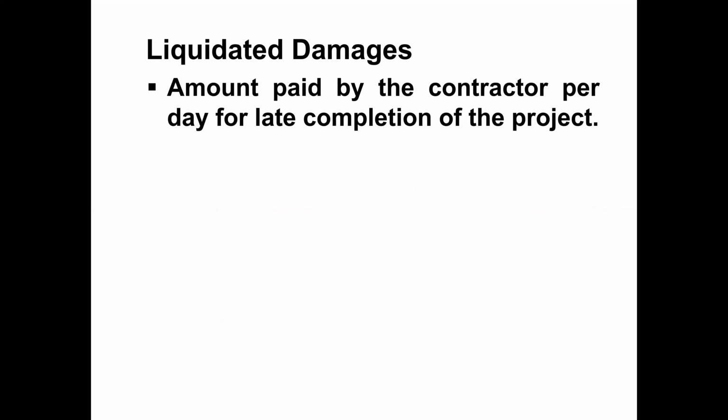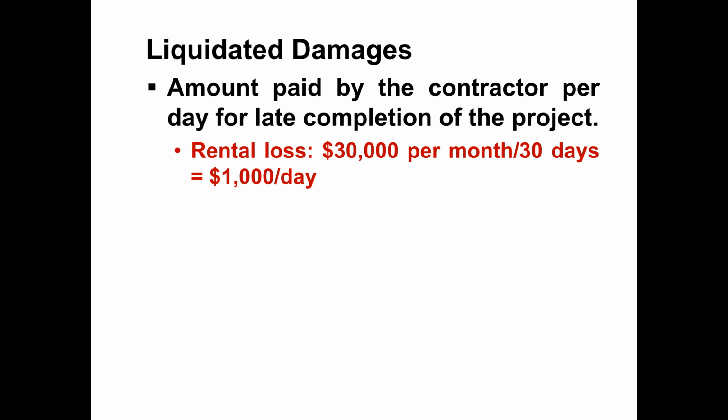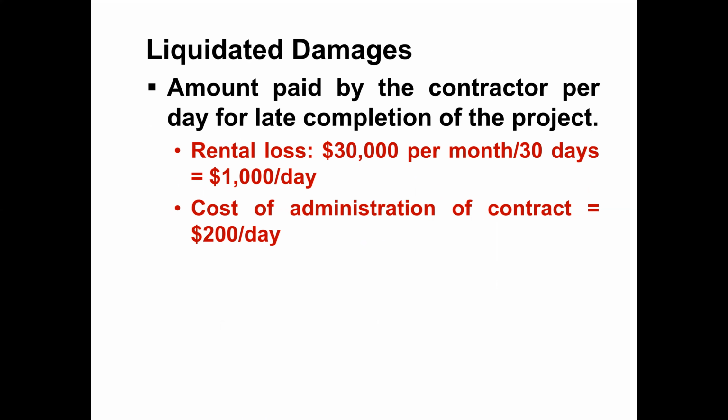So my dear student, let's move to the next word. What we are going to discuss among the issues during the construction phase is liquidity damages. Liquidity damages are the amount paid by the contractor per day for late completion of the project. So in every contract there are liquidity damages, the amount paid by the contractor for late completion of the project.